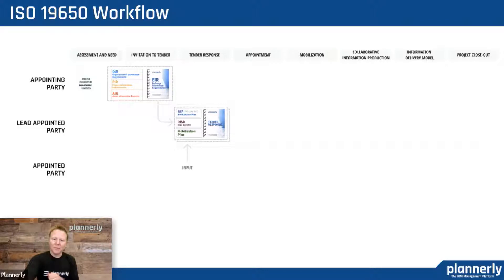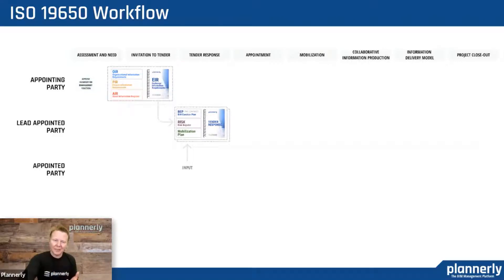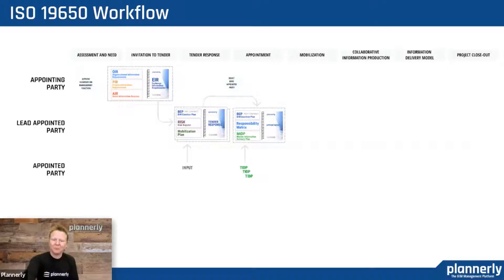Multiple responses come in with multiple pre-appointment BIM execution plans, potential risks, and mobilization plans, forming a tender response with input from the potential task teams that the lead appointed party has. Then at appointment, you're contracting the team to carry out the project, and we add the responsibility matrix and the master information delivery plan — a combination of all teams' task information delivery plans.